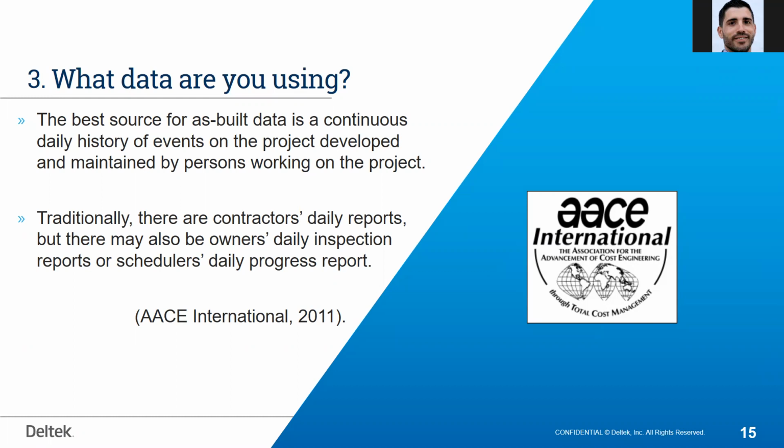It can be daily, it can be weekly, maintained by different people on the project. So you might need contractors' daily reports, you might need owners' or customers' inspection reports, progress reports.